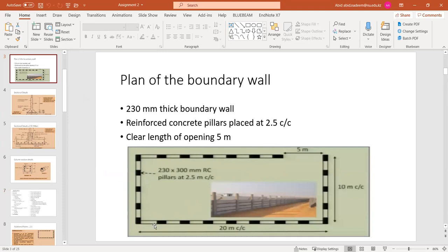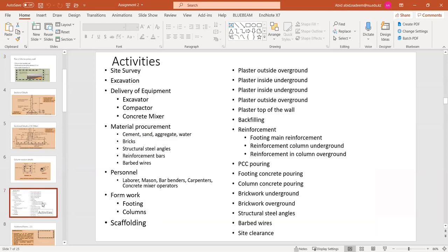for the next activity. Then on the second day the excavation for this has been started, but on the second day this area is available. So what activity can be done on this area? Can you tell me what activity? Based on the logical relationship, after the excavation, what activity can be performed? Start PCC pouring. Yeah. So the concrete bed, the lowest bed for the concrete pouring,